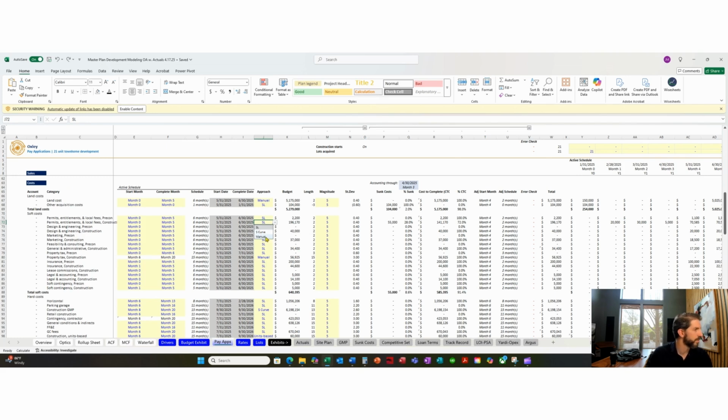You can use an S curve, or you can do manual entry, which allows you to create your own curve, right? So the total budget, which we figured out elsewhere, and then if we're using an S curve, how steep the S curve you want. And then over here, this is what I think is really nifty. We track historicals in our models as well, so that we can maintain a rolling forecast, and that forecast can be a little bit more accurate as we progress through the project and spend money.